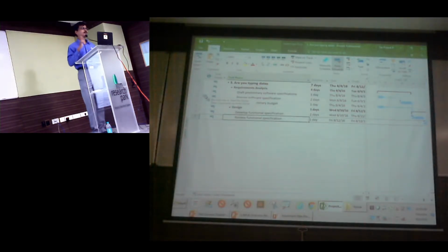There is no foolproof way to avoid this. It's more of discipline. Never drag a task there. And if you have done it, just always check the indicator column if you have any calendar icon, because constraints are always respected over dependencies.